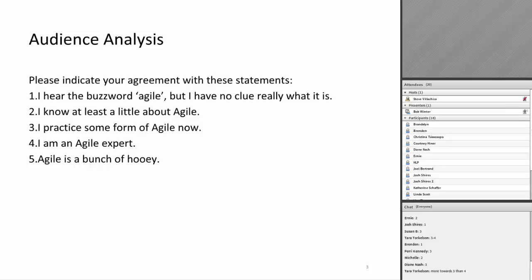So in the ID world, for instructional design, we run into this where we might create an e-learning and we'll make it so small and create it in such little pieces that we're ready to deliver something within 2 weeks. But then it takes our operations function, who runs our learning management system, a week to implement the same e-learning. So that can cause a problem because we can't get completely finished and deliver something within 2 weeks based on that dependency.